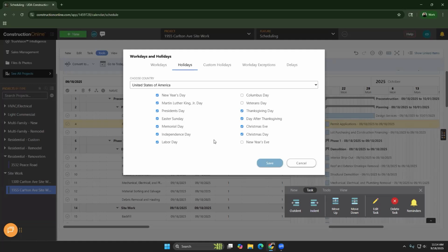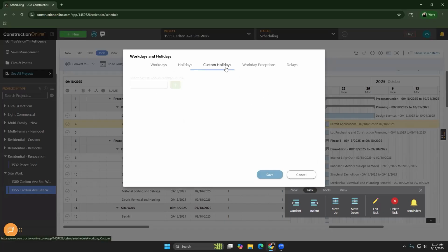So you don't have any awkward conversations with clients where you're saying, hey, by the way, we have off Christmas and I accidentally scheduled us to work that day. So there's going to be a slight delay. You can also build custom holidays, so you can add custom dates where, hey, normally we don't work on July 3rd or July 5th. We have a 3-day holiday. You can add those in. Or if you plan on working on a Sunday that you wouldn't normally work on, you can add workday exceptions. So there's a lot of customization between saying when you're going to be on the job site and when you're not.